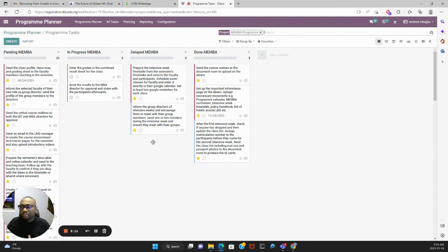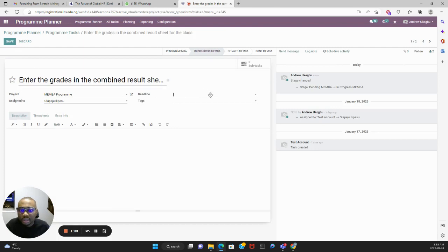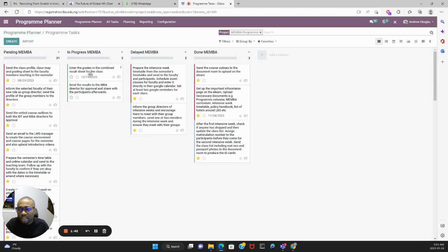Also, I will quickly show you how to set deadlines. All these are in the training materials that are uploaded in the course. And basically, to create a deadline for all these activities, you select the particular activity, and you click on edit here, and you select the dates. Let's assume the deadline for this date is December 14. I select that, December 14. So if I come here now, I can see December 14 as a deadline.